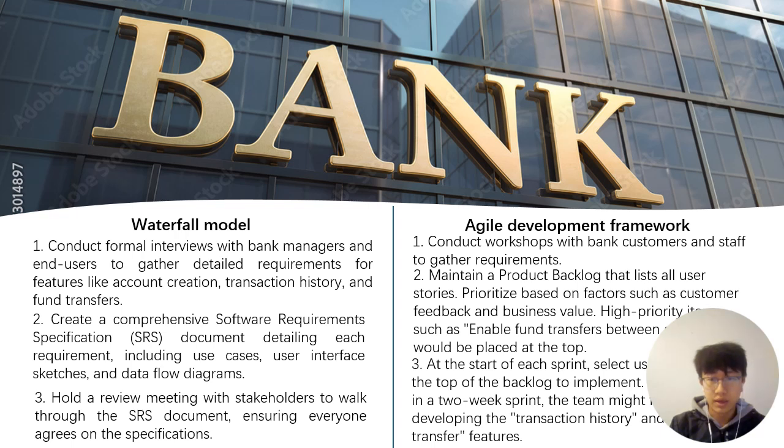And the third one is, at the start of each sprint, select user stories from the top of the backlog to implement. For instance, in a 2-week sprint, a team might focus on developing the transaction history and the fund transfer features.